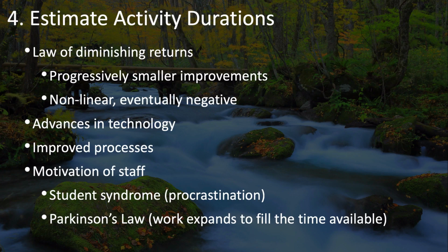Parkinson's law is the idea that work tends to expand to fill the time available. A task that's given a week to do could take 2 weeks if you give it 2 weeks. Ways that you can mitigate these problems of student syndrome and Parkinson's law are that you can decompose your tasks and activities into smaller pieces so that it's easier to manage different priorities.